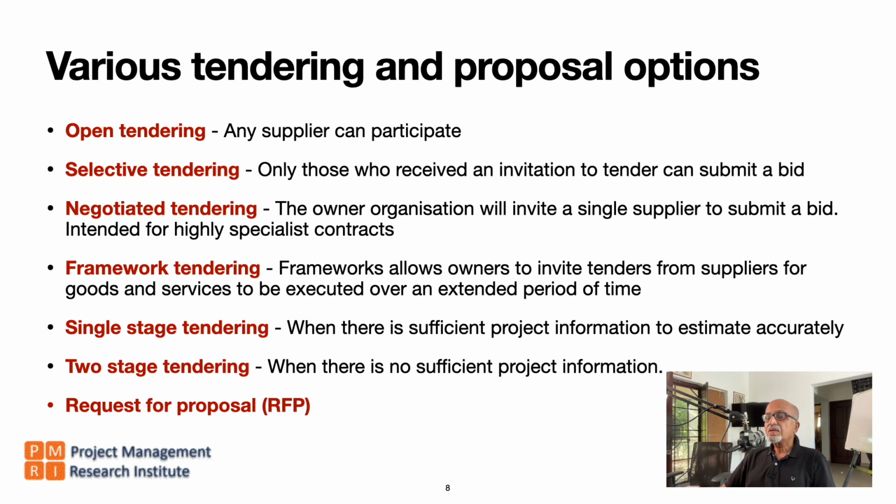Then framework tendering. Frameworks allows owners to invite tenders from suppliers for goods and services to be executed over an extended period of time. Sometimes we call it a running contract.